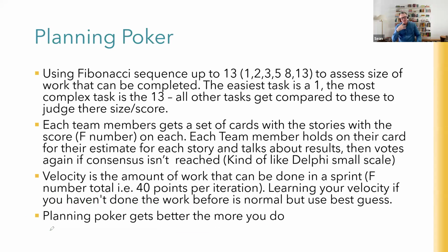And the other ways of doing this, like t-shirt sizing, small, medium, large, extra large, is absolutely a fine way to do it as well. I've seen people use t-shirt sizing. What you're just trying to get is your estimate for effort for every user story. You know how much the total effort you can do per iteration, so you shouldn't do more than that. So that's how they do estimating in Agile.